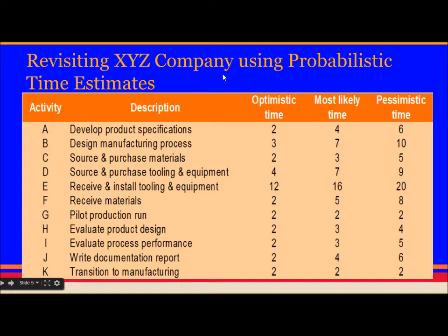This is another chart which will give us the optimistic time, most likely time and pessimistic time to complete certain activity. For activity A, the optimistic time estimate is 2 weeks, most likely is 4 weeks and pessimistic is 6 weeks. This chart will be given to you.